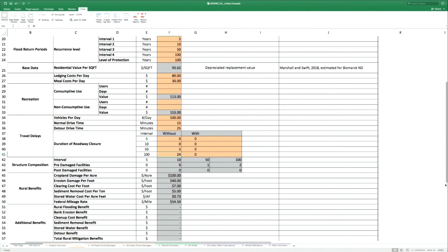Similarly, for loss of life, on one of the projects that we are working on, even though there is no direct loss of life at that structure in the past, we have documented fatalities on other structures within the state in the past. Would that or could that be used to justify a benefit? I would say yes, if you can document and justify including the loss of life as a cost averted, that should be part of the benefit.